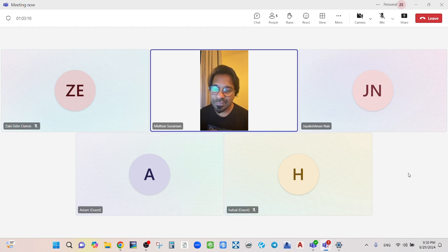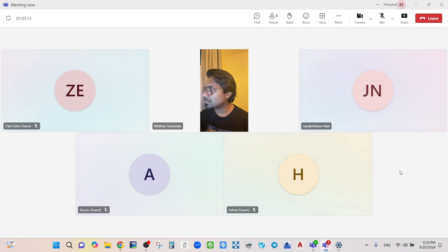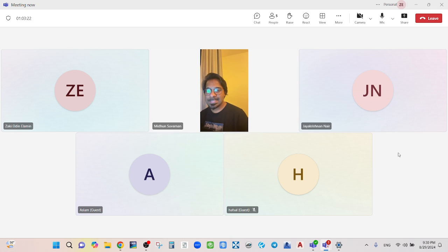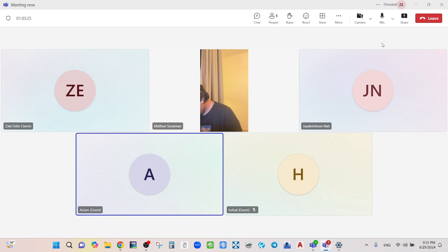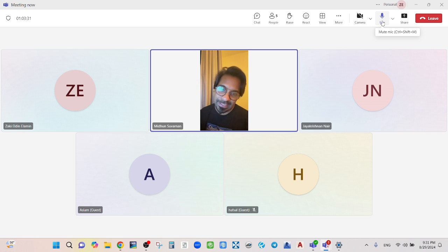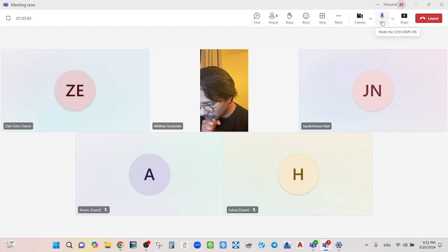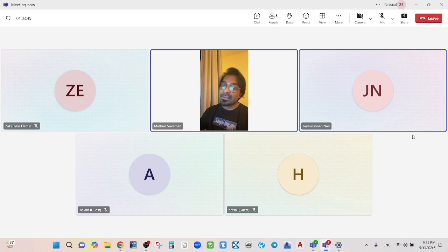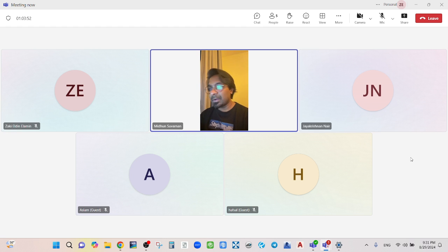What is the function of the retention amount? You have any idea? There is retention money in the IPCs, right? Yes, even after taking the taking-over certificate, we have some obligation towards the employer, like warranty. So this is a surety for that. Exactly. Normally, as per FIDIC or any standard form of contract, they will release 50 percent after TOC, and the remaining 50% after completion of the DL period.